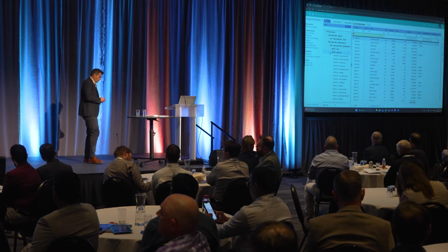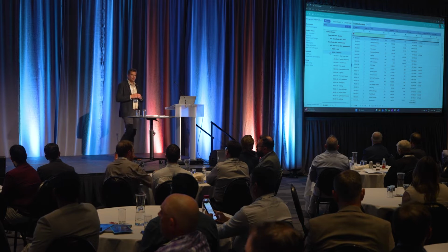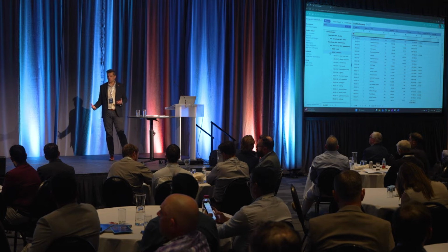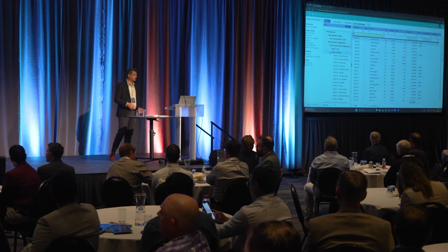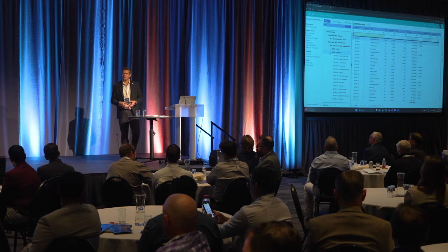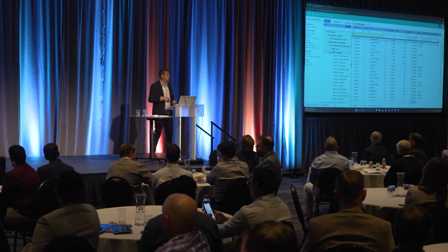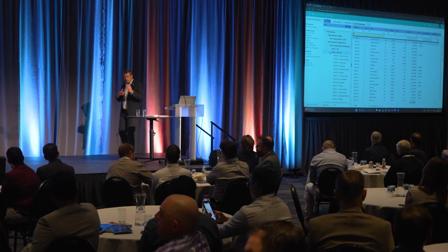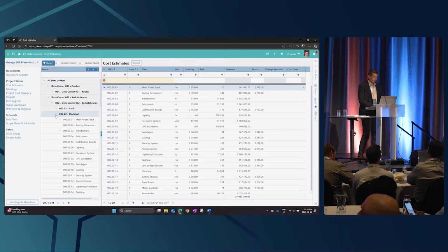Okay, so what's the cost of my portfolio? It doesn't really cut it when you're analyzing your numbers to look at those total costs. Yes, it's more expensive to build things in Newfoundland than in Alberta. Well, guess what? There might be no reasons for that, no details to that. Let's look at the man-hour rates. Let's look at the weighting for quantities over man-hours. Let's look at percentages of the different disciplines. That's what you can use for meaningful data. So let me go ahead and look into that.